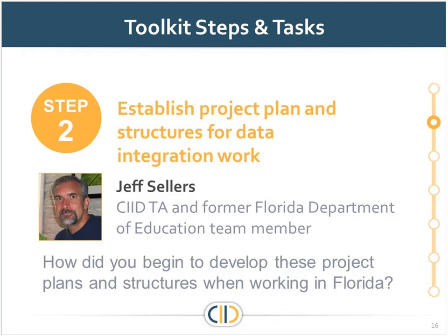That again would be the place for the integrated data. And so once that vendor was identified, it was very important for us, a priority for us within the agency, to partner with that vendor. So we actually assigned resources within the agency to work alongside the vendor. And really this was an aspect around knowledge transfer, to prepare us for once the project was over and the vendors left, that we would be able to pick this up and continue moving forward with it.